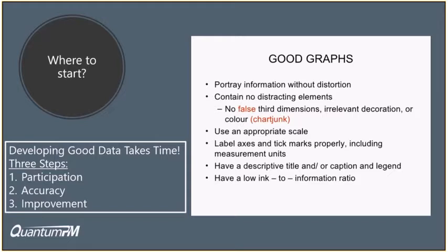So one of the lessons that I learned early in my project management life was I had a project that was a good-sized project, and things were going pretty well, but I was in the early stages of the project. So I had reported it was in green status. Everything was good. And from my perspective, it seemed like it. I had a very wise leader who said, that project is too big. There is no way that it can be in green status.